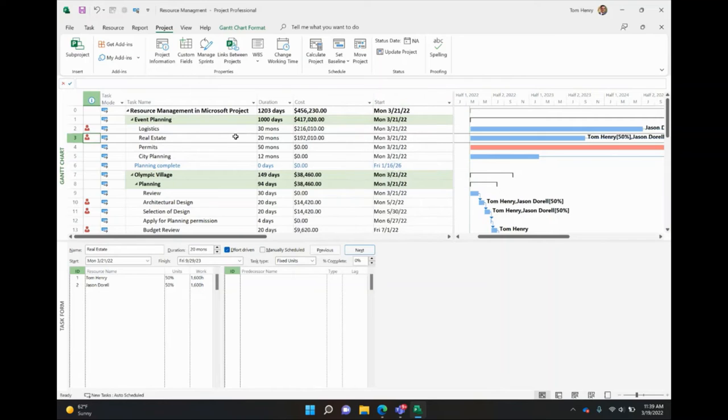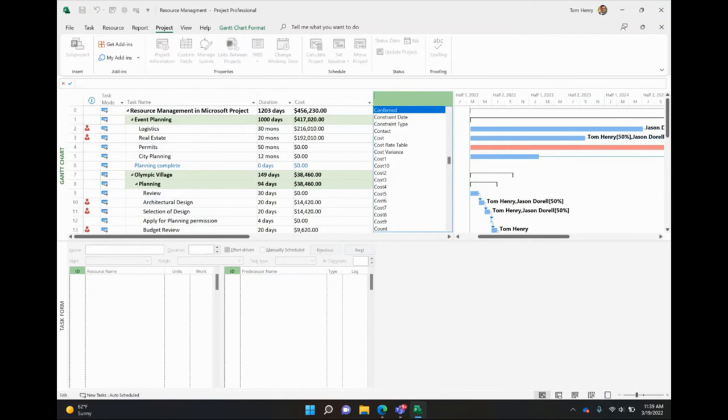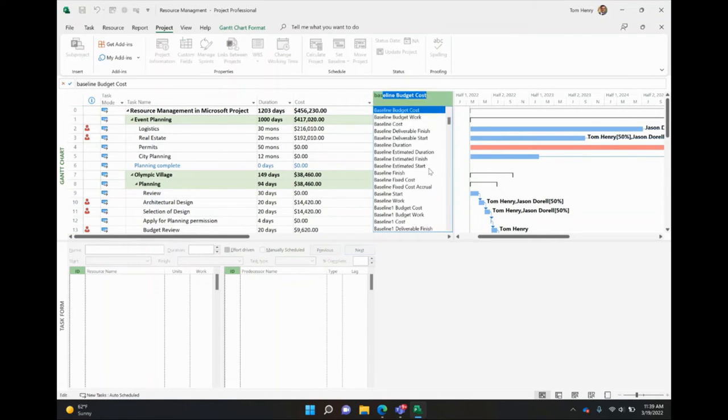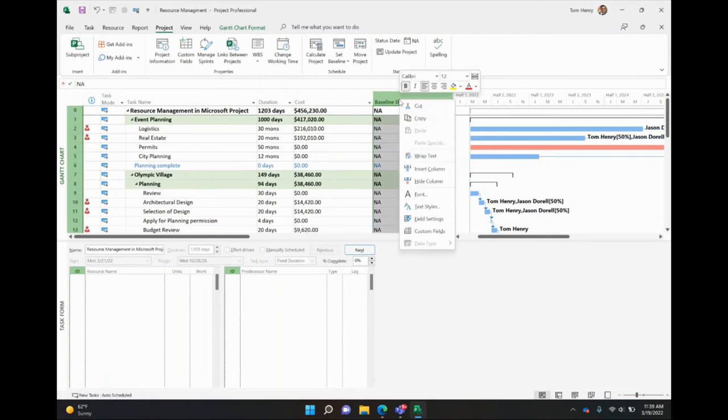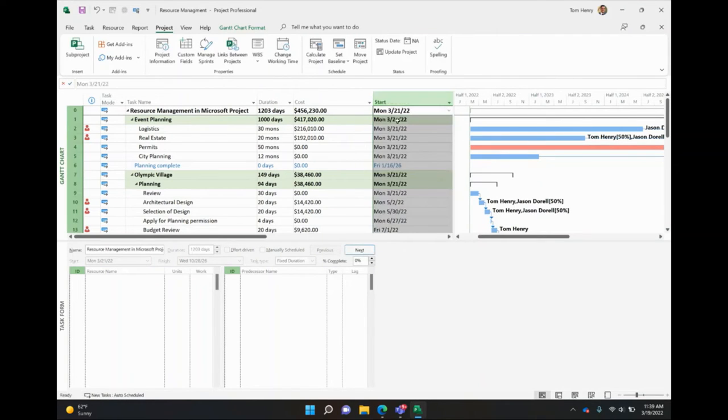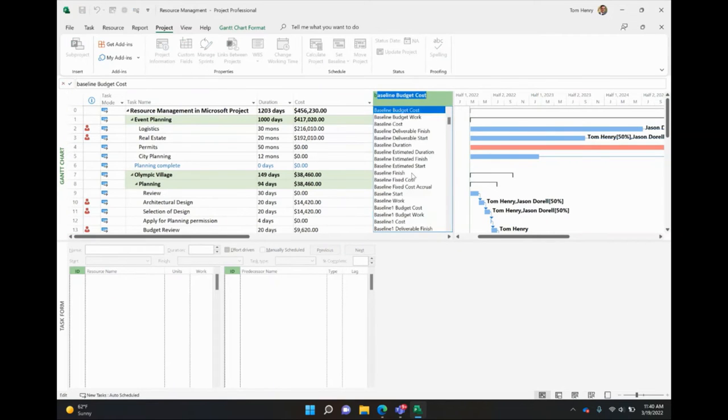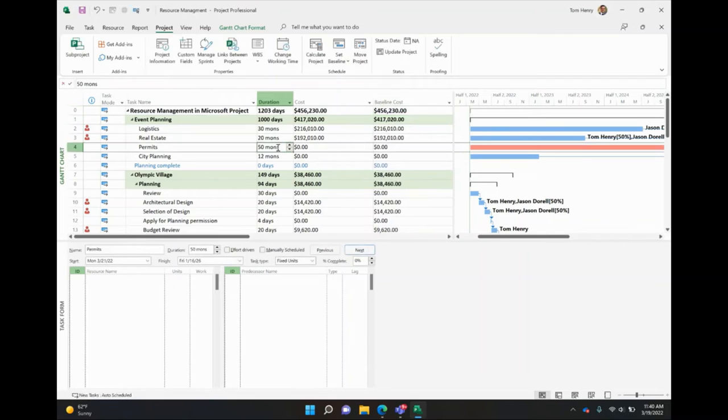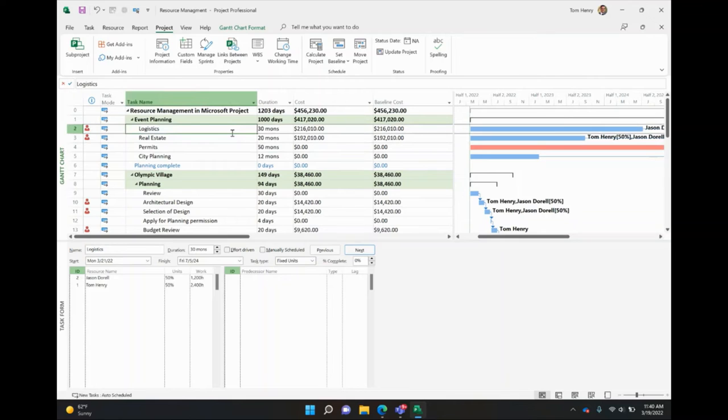I have another video on baselining if you want more information. But right now, we've just taken all of our information in the project and saved it to a baseline so we can now start tracking not only the costs, but also the baseline costs. The baseline is the, I'm terrible multitasker. Baseline cost. There we go. Baseline is a save date at the start of your project before you get it on into the project so we can know what did we plan to spend, what did we plan to work, what was the planned duration, etc. I like to see the costs here. And we'll look at that as we go into our next topic, which is tracking project progress.